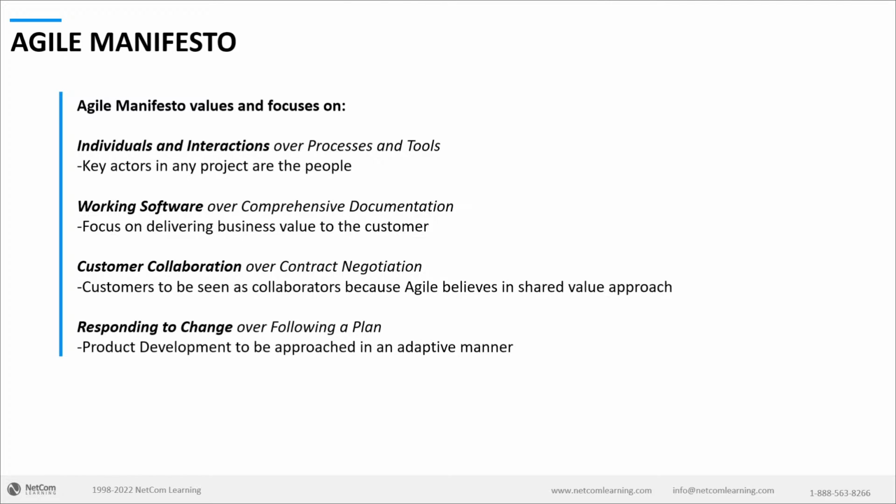And every time the product owner agrees for a change, they also need to agree to an equal amount of work moving out of scope. If that's not happening, that essentially means that the product owner is also agreeing to the increase in cost and time for the additional work that is coming in. So that's what the Agile Manifesto is.